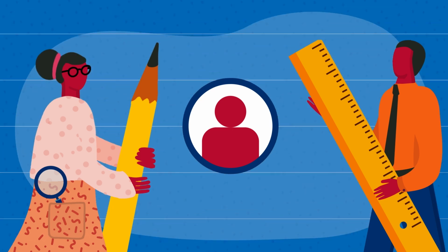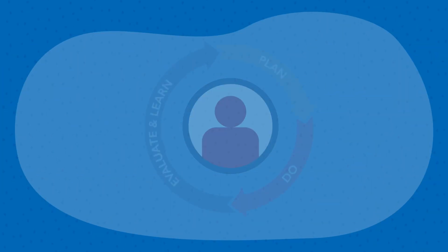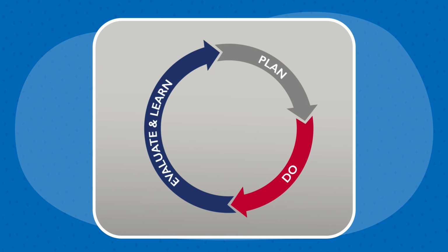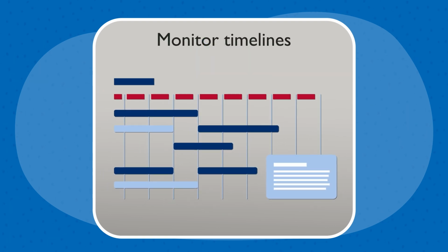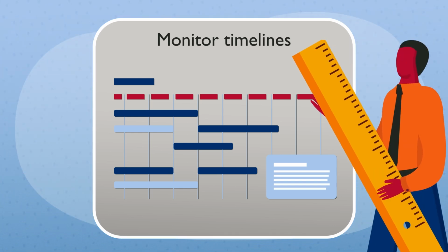In this example, you have implemented adaptive management. You identified a pinch point based on objectives you had set and facilitated an internal reflection with your team to determine a new path forward. You'll need to monitor key indicators like timeline as you move forward to ensure that the evaluation stays on track. You may find that more changes are needed to how you work with the client to ensure the project is completed. There are many tools to help you implement adaptive management.